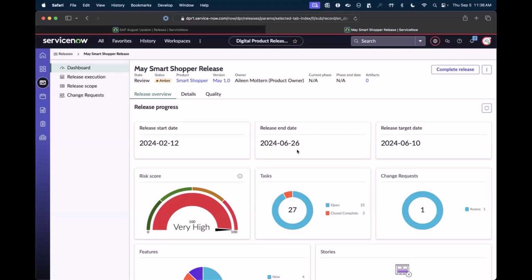And this is a subtle difference because for some customers, the end date and the readiness date are the exact same thing. But other customers need to make sure that what they're delivering is ready days or weeks before you will actually deploy it. It's not uncommon that I've talked with customers where they have a Wednesday readiness date because they do a deployment over the weekend and they want to make sure everything has gone through the change approvals before that weekend deployment. So Wednesday is the day that things have to be ready from a release perspective so that they can deploy over the weekend. It's a common scenario.